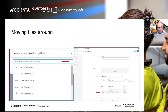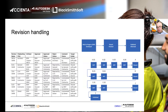The approval workflow can have as many steps as needed. The important part is you can decide where a document goes once approved and what happens if it's not approved. The statuses required per ISO 19650 — Approved, Rejected, Approved with Comments — are configurable, and you can add your own. Once approved, you can specify the destination folder. For the Shared and Published folders, nobody can manually add documents — they must go through the approval workflow, ensuring accountability: whoever approved the document is the authorized person.